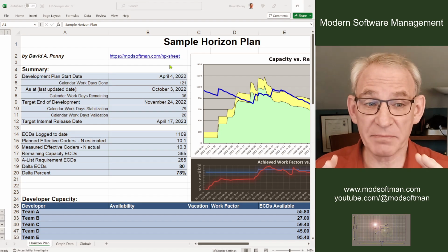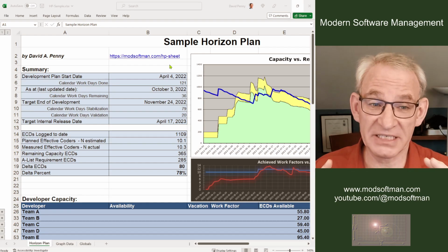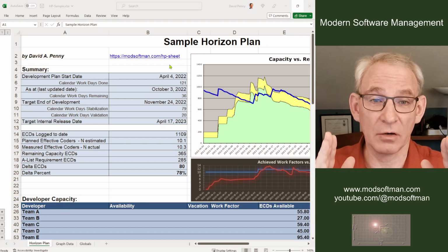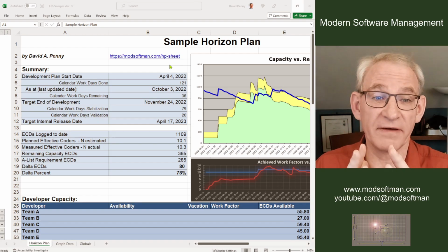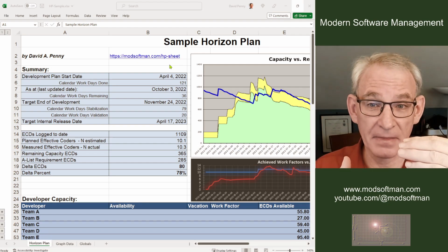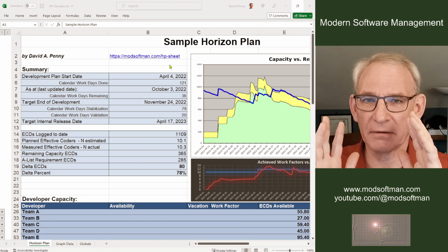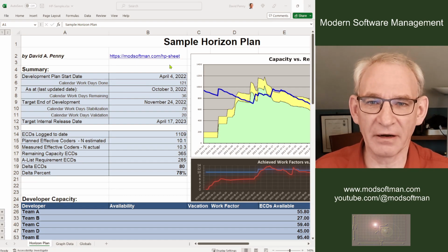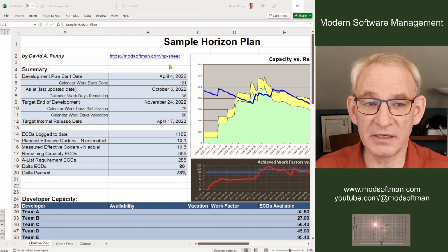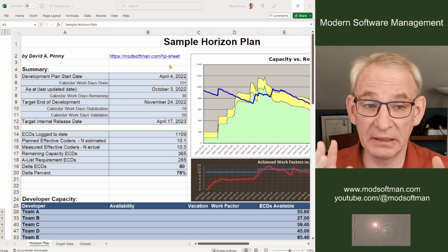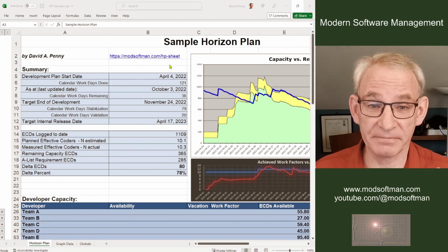If this were a SaaS-based product, it's simpler. You just don't have those phases. You just do all of the work within the so-called coding phase, and you continuously release your features to production. So it's a very similar plan, just doesn't have those 2 extra phases. And I'll do a video later on explaining a little bit more about the difference between those 2 things. But for now, this is for enterprise on-premises software with relatively larger release cycles.